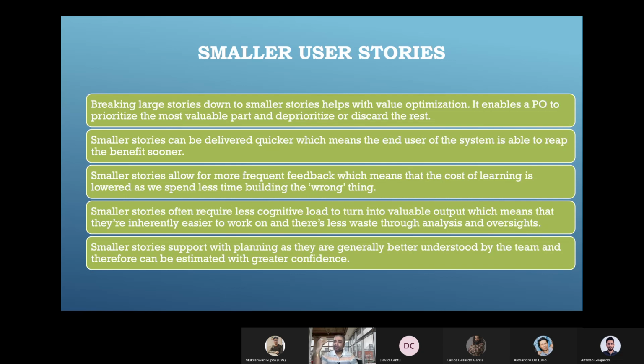So the product owner and the scrum master also can come in between, or as a dev team, you can say to the product owner, the estimate is very high. Why can't we break it down into further sub stories? So you will break it down into smaller stories.